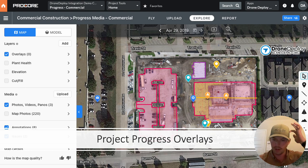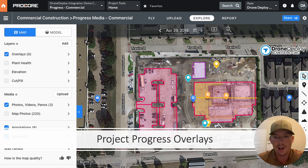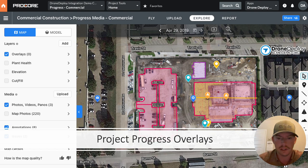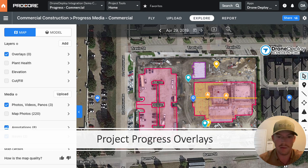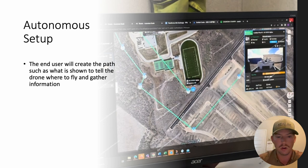Project progress overlays: you can see right here — I've done this on that old drone using Procore. You fly to the same exact spot, take a photo, click a button, and it uploads the photo and transitions from, say, April 29th to whenever you take another photo. You're able to see how the job has progressed from that same point of view between the two photos, and it highlights what has changed.